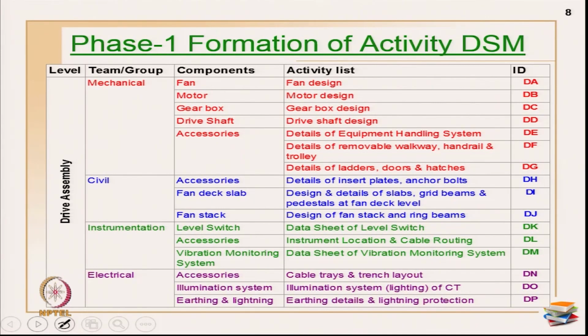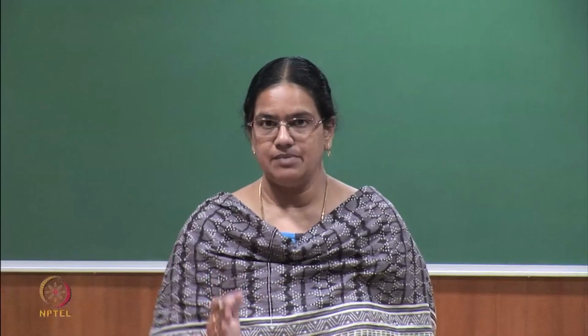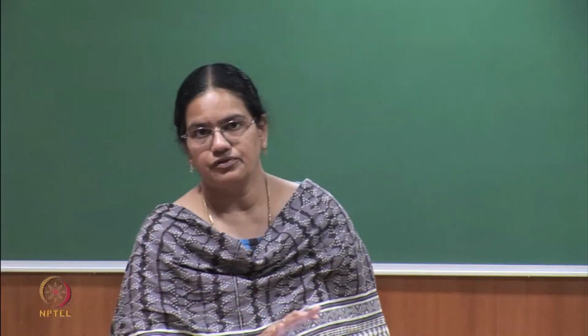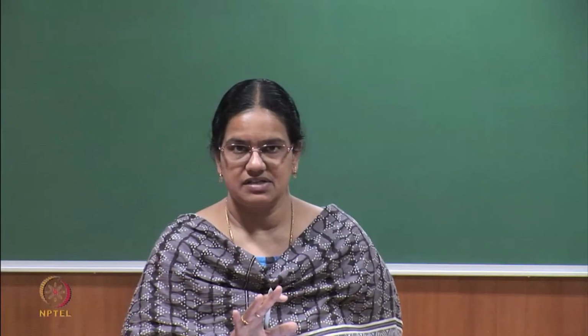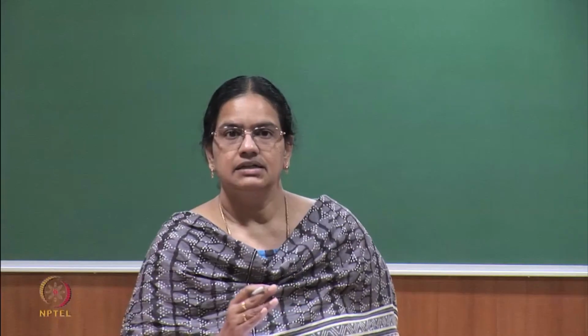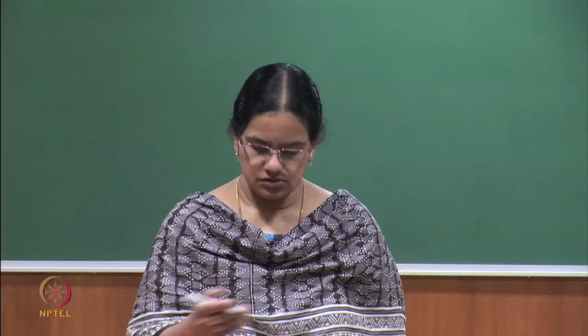As I told you, first you have to get the list of elements. The project is defined, I am going to work only on drive assembly level, that is very clear. Then for decomposition, I am going to use the WBS structure only, which is how the project team is very comfortable working. So, I am also going to show it in the same way. So, drive assembly level, that is the level at which it gets decomposed.